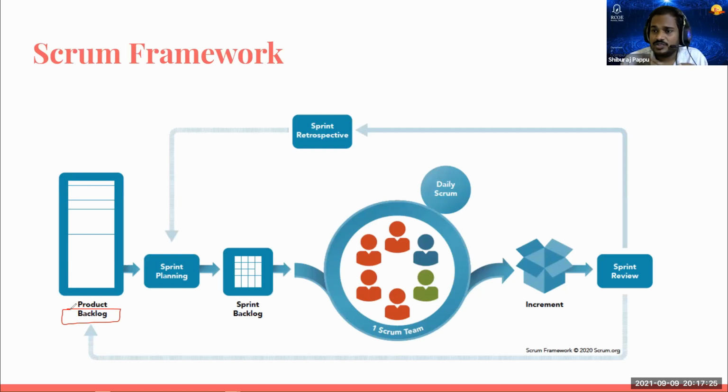So you divide the project into small parts, right? So the first step is before the sprint starts. Okay, so if today I want to start the sprint, I will do a sprint planning meeting. Sprint planning meeting is between the product owner, the scrum master, and the development team. So they all sit together.